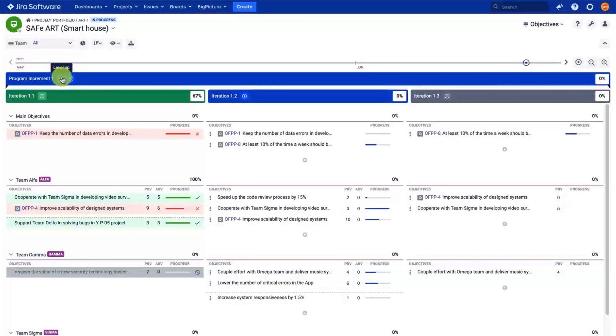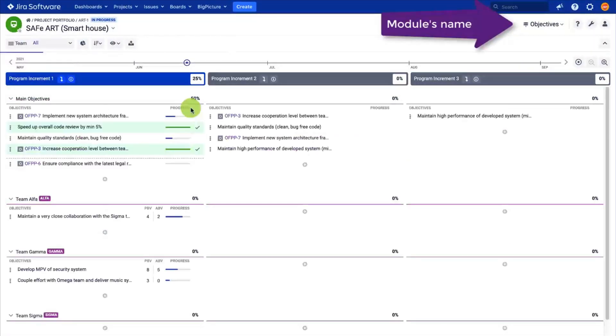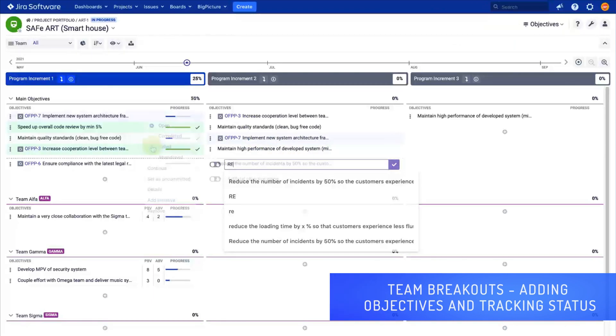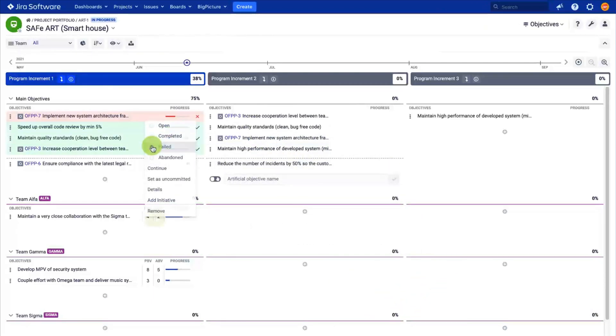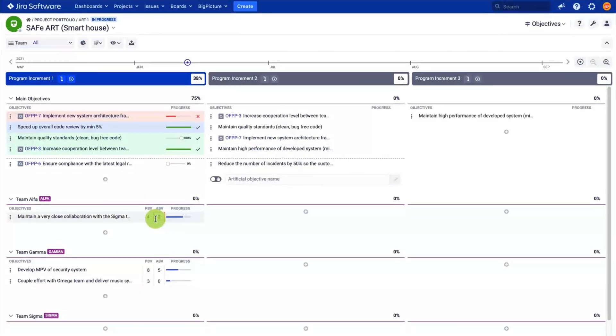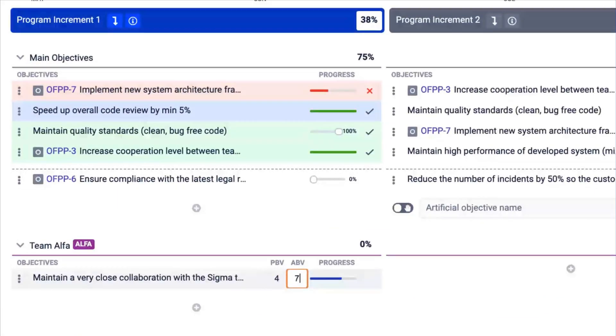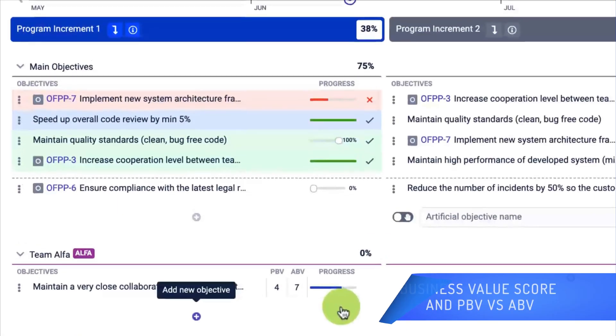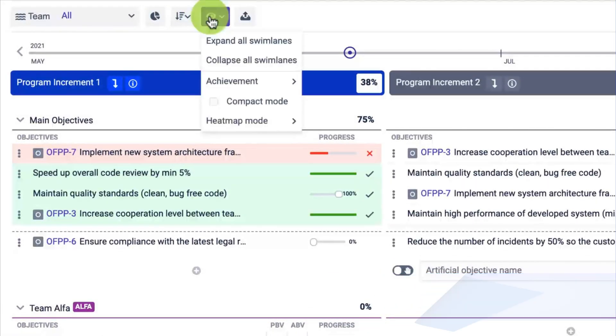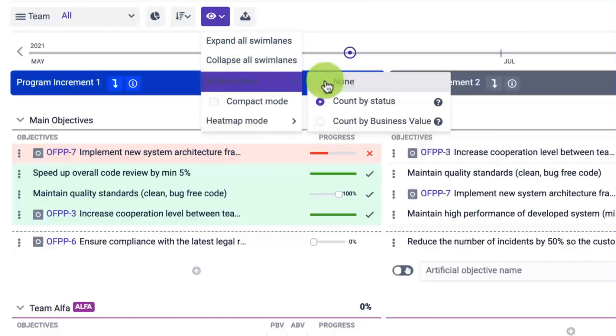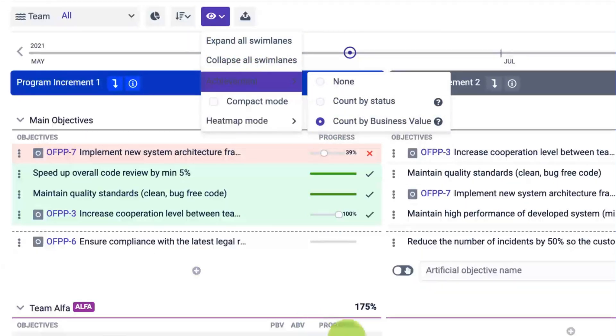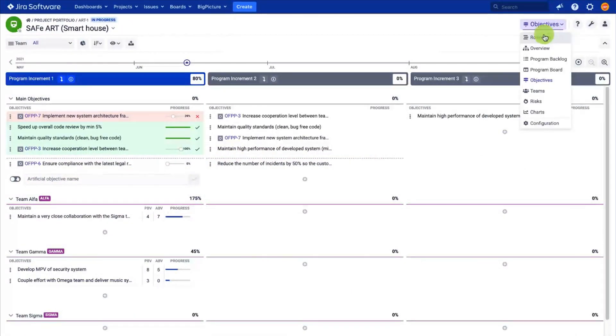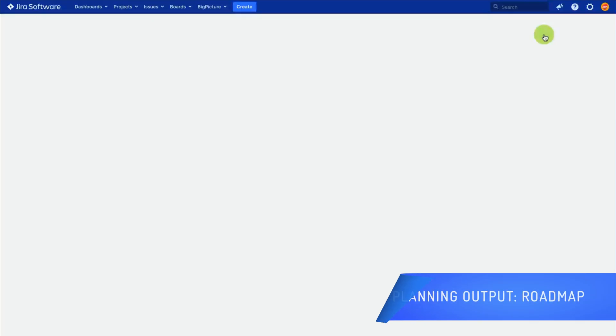It is time for the release train engineer to set the PI objectives based on the information provided by the teams. Open the objectives module—the default name is roadmap. Add the objectives and track them using their status and reports. You can also set the planned business value score, and once the data is available, the app can calculate the planned business value versus actual business value ratio.